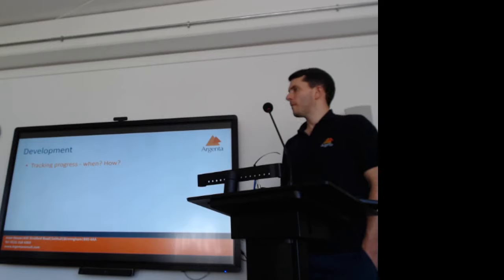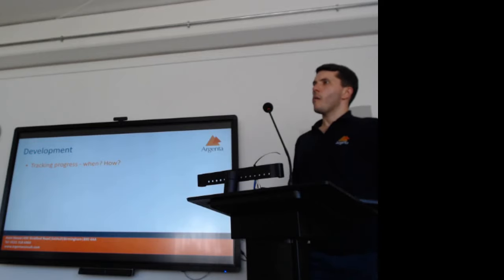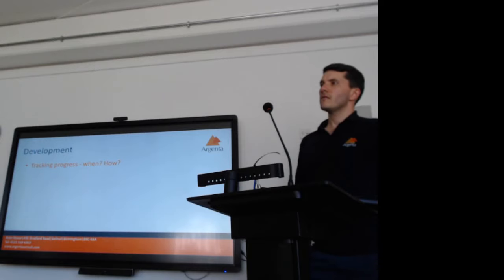Yeah. I use JIRA now for space and concepts. So I have detail and I have vagueness. So in JIRA I actually track time, basically I have a stopwatch. I pick up a task, start a stopwatch, stop it when I'm done. And you can put back estimated remaining time so it works out 50% done or whatever. So it gives me lots of detail. But at the high level, once a week I score every project out of 5, where 5 is fantastic, and 1 is, sh*t, we're in trouble. And the combination of those two seems to keep things on track.